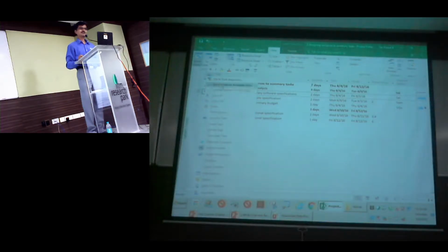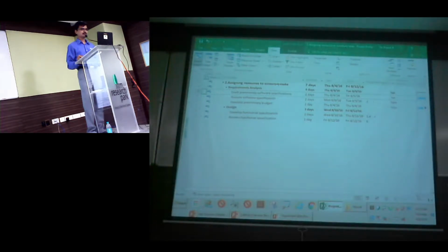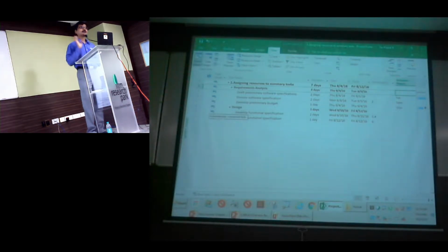Okay, they will say reschedule it to the next available date. Nothing will happen. They will hide that one. Easy solution. They write it down. Why do you show the problem if you don't solve it? But the solution here is, you can't resolve it. So the only way to do it is to make sure that Sai has been removed from either the subtask or from its summary task. So the moment I do it, do you see that? Now the resource is happy.